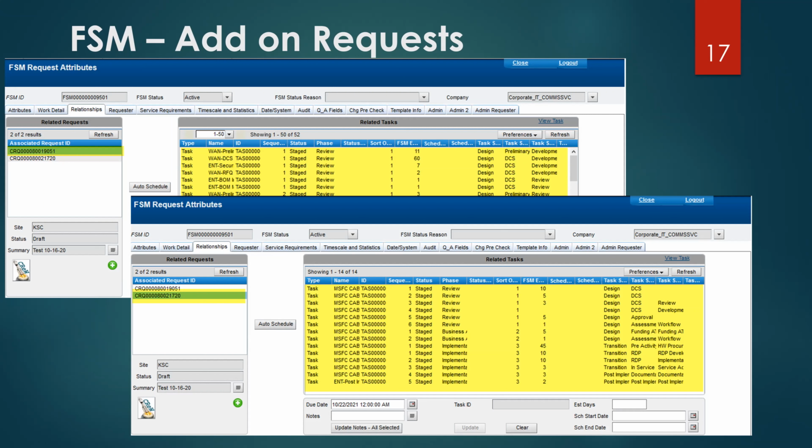Only scenario that is an issue, and you can see down near the bottom, there's a task for the add-on that says in service. So the piece I did not account for in my automation was that 2 different change requests would have in-service tasks in them. So that's a manual process that they've got to pay attention to: remove the in-service from the ones that they think they're going to complete before the main one does. So if there's only one in-service task, all I have to do is cancel that in-service task, and it won't trigger the in-service event. Okay.